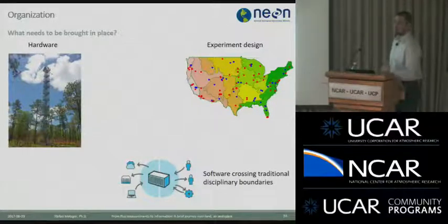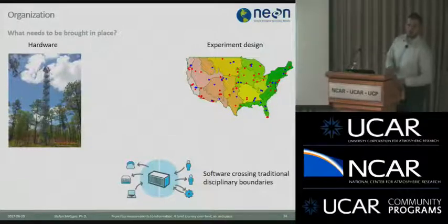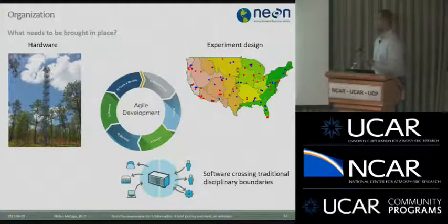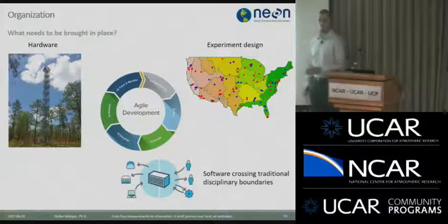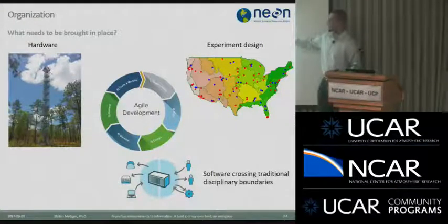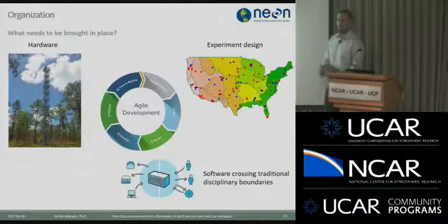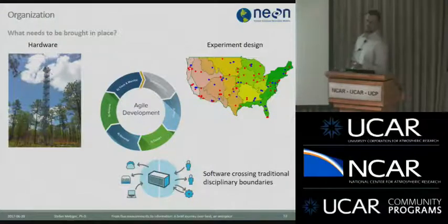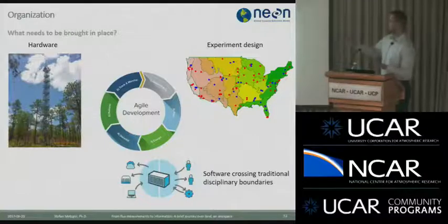And we also, especially when working in larger teams, such as I also see here happening at NCAR, do need a cross-coordination mechanism. And what we've been quite successful with, I think, in the past 1 to 2 years is called an Agile method of development, where initially the heterogeneous group of, for example, engineers, scientists, stakeholders, and so forth, agree on certain requirements, acceptance criteria, definition of done, then an original design is derived. The design is chopped up into individual responsibilities, and then we regularly meet, every 2 weeks essentially, and bring this back together. And so we apply this methodology to the science of environmental response function here.